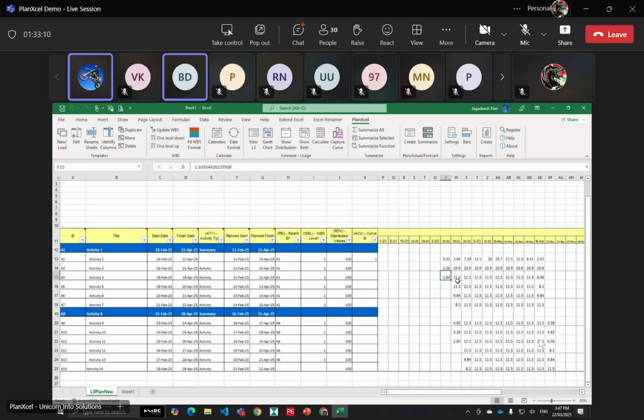So this way, whenever you see the distribution, you will always get whole values. For example, you are doing some spooling and you need to complete 10 spools. You should not say that you should complete 11.5 spools. So either you will say you complete 11 spools, or you will say 12 spools. So this is the funda. In order to have definite whole numbers, this feature is given.